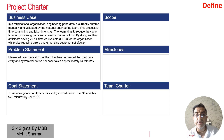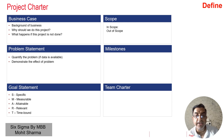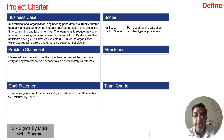The next very important element in a project charter is to define the scope of the project. If you don't define the scope, most projects will have scope creep — meaning your management will keep increasing the scope and you will not be able to finish on time. You should define two things: what is in scope and what is out of scope. In this example, part updating and validation is in scope and all other types of processes are out of scope.